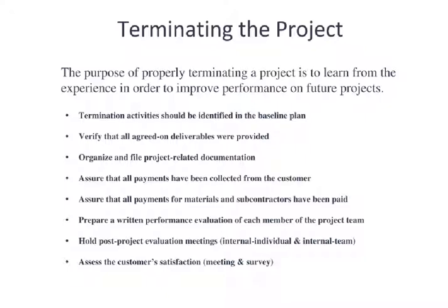Now, there's sometimes a delay in this. Many companies will have policies where upon receipt of a bill, they have 30 days or 60 days, sometimes even as much as 90 days to provide that payment. So there is a bit of follow-up work required by the project manager or someone tasked with this responsibility by the project manager to make sure all the payments are processed. You can't just assume it happens. It takes effort.